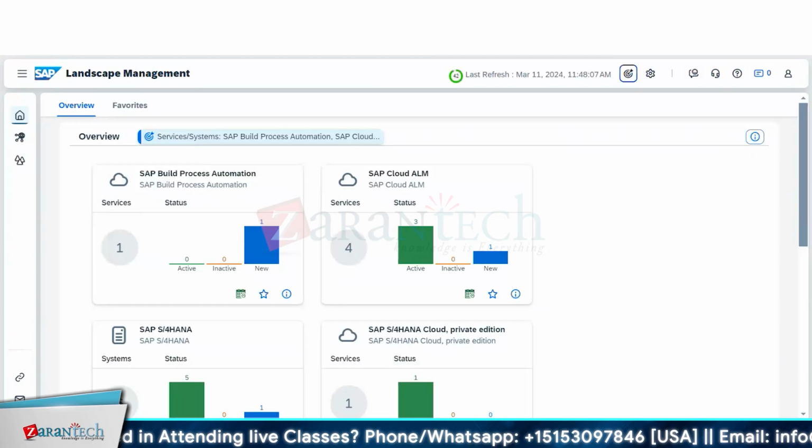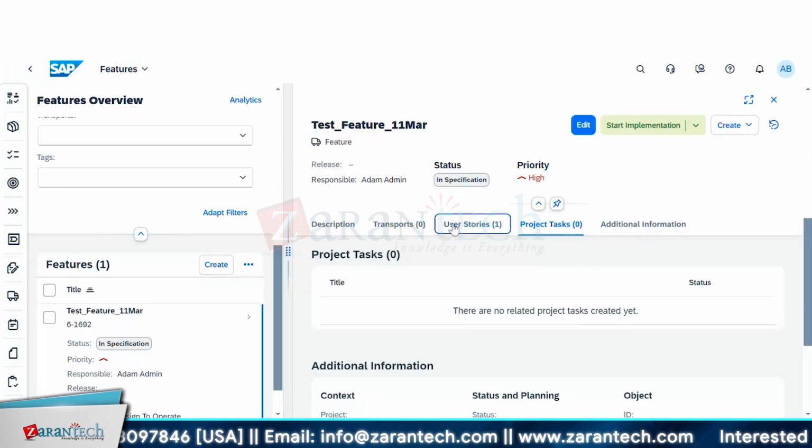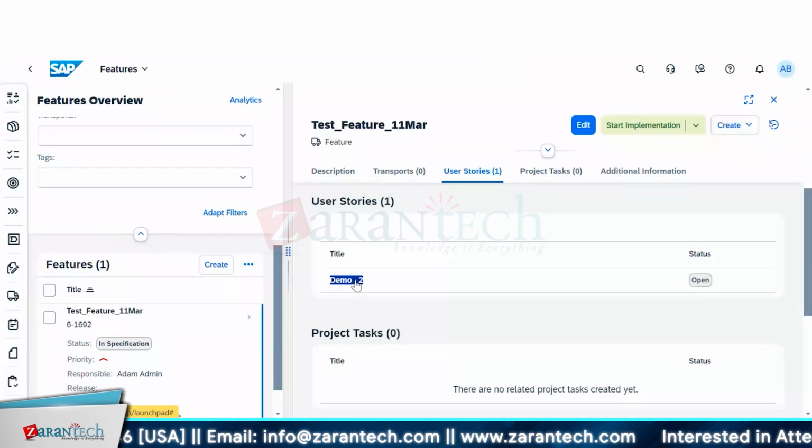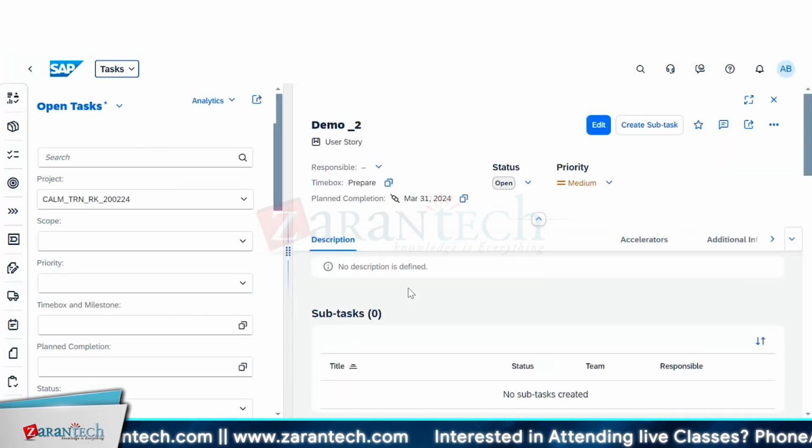So tasks can be dependent and interdependent as well. As you just mentioned, it's for the effort estimation. Pradeep can mention that his task will be only 1 hour, and someone else can comment that for them it will take 2 days. On that basis, we'll comment whether this user story can be completed in this sprint or will go to the next sprint.